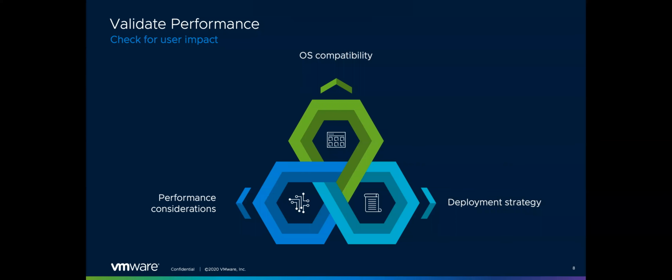You want to make sure that at one point, when you kick off the deployment of the initiative, you want to stop the bleeding and make sure that newly provisioned systems have the appropriate security tools on them. So account for that as well. So again, deployment strategy could be: update images and templates, identify UAT testers, roll it out in phases, and I'll get into what we had done here at VMware in a moment. But really, you want to come up with a solid deployment strategy and set realistic expectations.